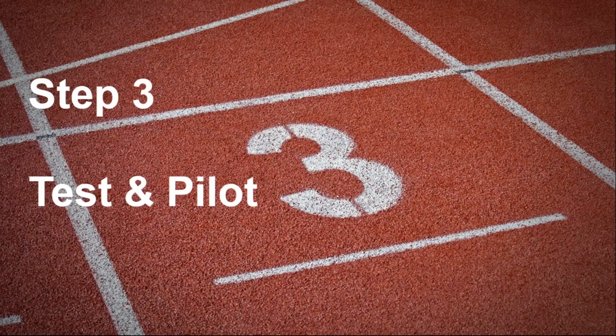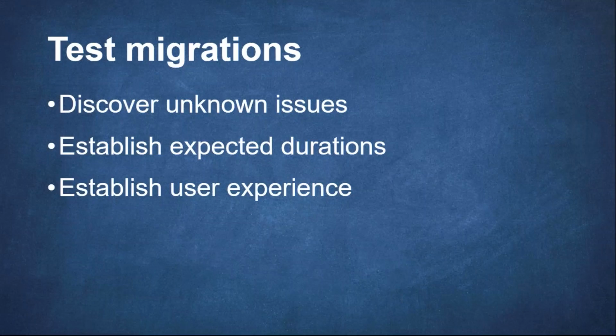Step 3, test and pilot. We start with test migrations to help us discover issues that we may not have been aware of during planning. It also helps us understand how long a migration may take, which can help with scheduling. We also want to put it into the hands of select users as soon as possible to understand how they will react to the new site.